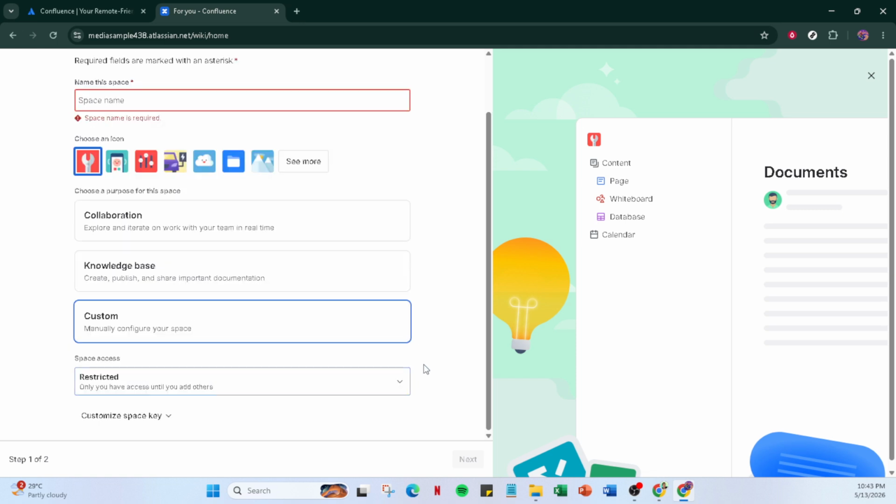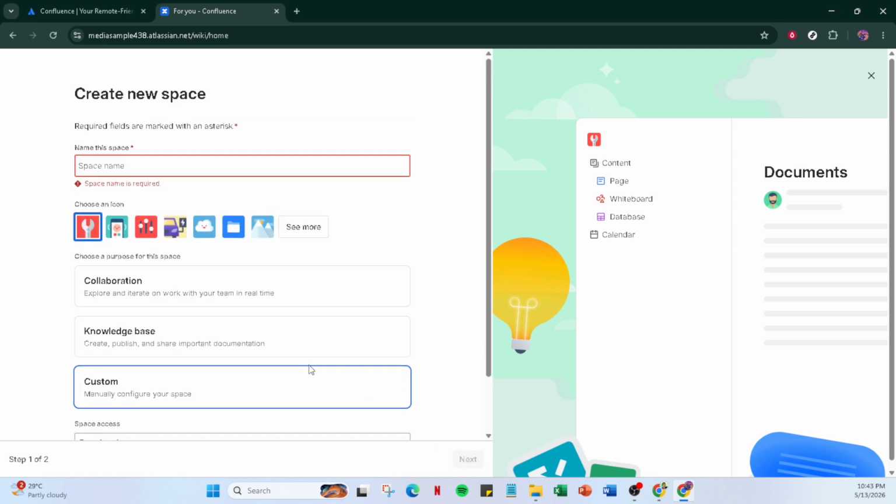Outline the project goals, scope, and objectives so everyone shares the same understanding. Capture a brief problem statement, success metrics, what's in scope, what's out of scope, and major milestones. Keep it scannable and specific. This page becomes your North Star for decisions and trade-offs.